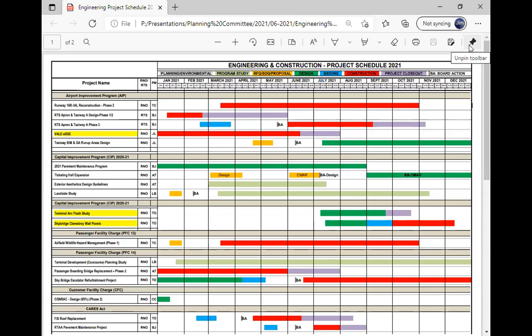With those new approvals that you did, many of these items are not coming to you. They're an amount that the CEO will be approving, within your bidding limits. Just a reminder, anytime you're under $100,000, you're able to do what's called informal quotes. That's where you go out and attempt to get 3 contractors' pricing. So you'll see these on your updates as far as the schedule, you just may not see them before you as a board item for approval, with the new limits that the CEO can award and following NRS law as far as informal quote or bidding. Anything over $100,000 requires a formal bid. So just a quick reminder on all that.